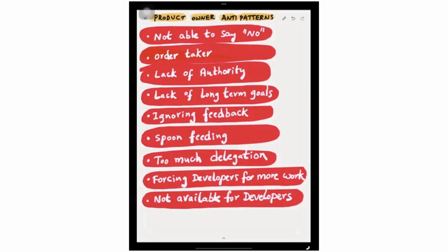That will clear things up for the developers instead of keeping them in the dark. A product owner attending the sprint review along with the stakeholders without contacting the developers in between is not a good idea. Great product owners will have time to work with developers to see the items built in the current sprint as and when they are done and give feedback. And they work very closely with the developers for providing any clarifications, etc.